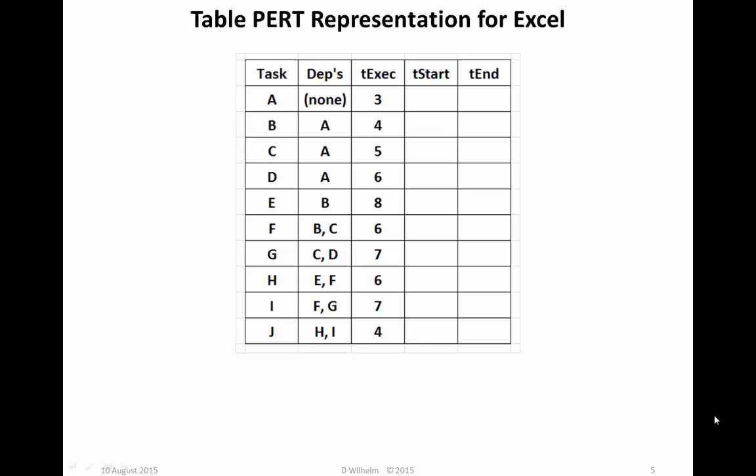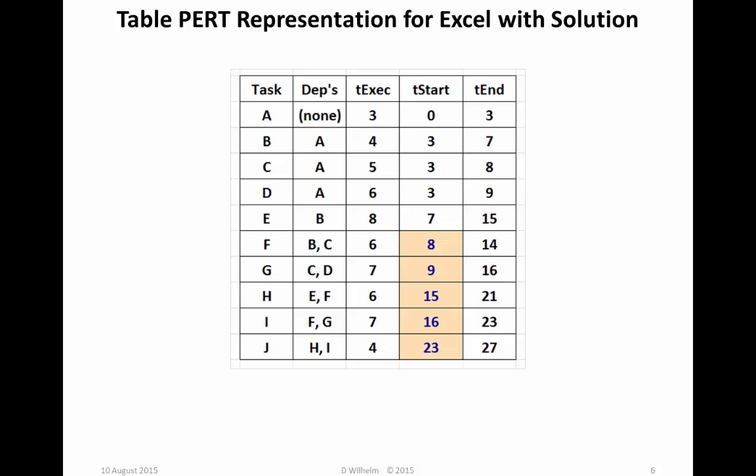A useful simplification that can be made when doing the PERT calculations simply in Excel is to identify the start and end tasks. In particular, have a single identified beginning task and a single identified ending task. In this case, our case for this example, task A is the initial task and task J is the final task. Just a reminder, what we should have is this table. And tStart of A is 0, end is 3, and on down through task J, where the Time Start is 23, and the Time End is 27.